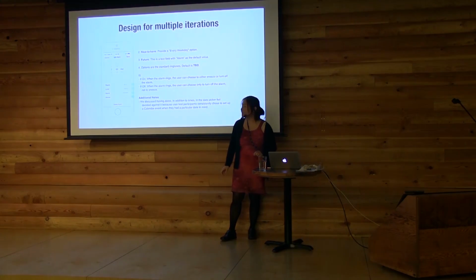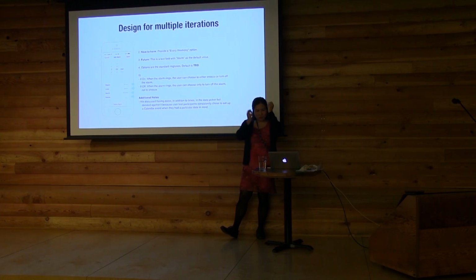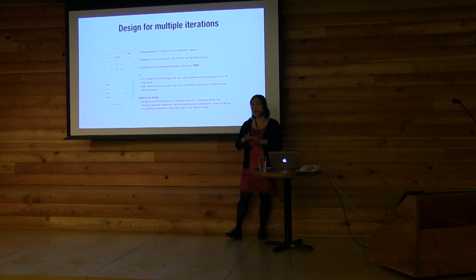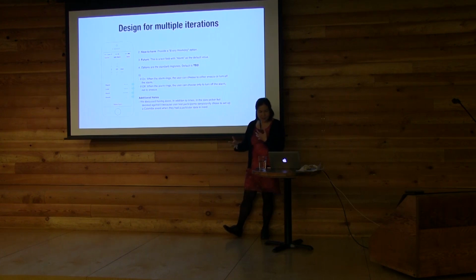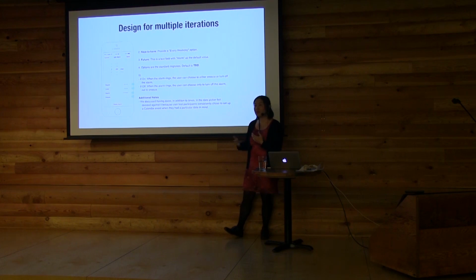Okay. Another thing I'd recommend is don't try to constrain design to what you can implement in one sprint. One way to seriously damage your designer's productivity is to try to get them to whittle down their design according to what developers can code in a given time frame. What happens then is the designer and everyone else spends all their time negotiating about how to do that right sizing. Okay, and you want your designer to spend time designing.